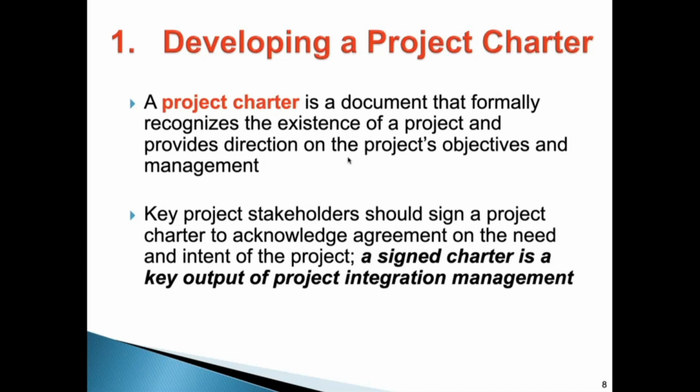Also in organizations, they use this document like a contract between the departments and the project manager. But sometimes if you are developing a project for someone like a client, who is outside the organization, in these cases usually the project charter is too short. You need to be very clear, very specific, because that's a different entity. So usually they substitute this project charter with a contract.